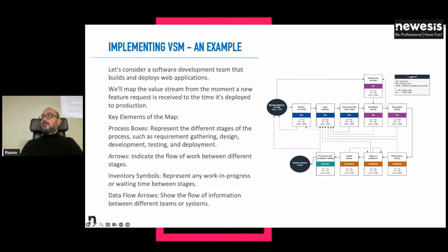We can see that definitely a point to be improved in this schema is the pull request and code review phase. Or better, what is happening before in terms of output, that is, in the code solution. Why? Because the percentage of complete and accurate drops from 85% in the code solution to 35% in that phase. So that is a phase where things are looping continuously between those two stages.